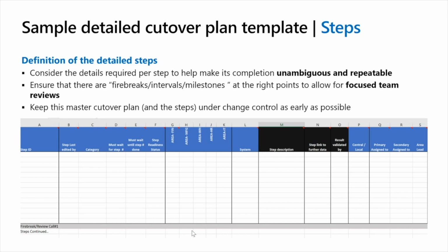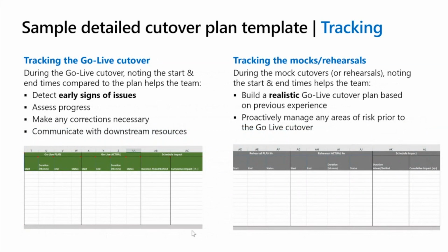If this step is complex and it requires 5 or 6 very specialist technical things that somebody's going to do in the background, you may not want to write all 5 steps here, but you may want to put a link to the document that defines it, putting all of that under change control and formally documenting it. The rule being that for the final cutover, there should be nothing that you're doing to the system that is not in this plan. Everything you're going to be doing for the cutover should be defined in this step-by-step definition.